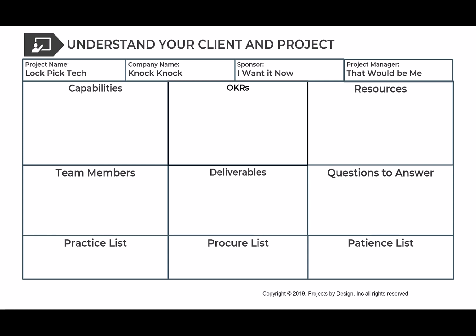Sciforma is the only tool that I've seen that does this well, where you can actually have multiple patterns, because what you run into is you have to do one or the other. In a Clarity or something like that, you do a work breakdown structure of activities, and you have to determine what level people enter their time. If it's at the activity level, they're going to have a timesheet of like 50 things, right? And then they start barking, and management says, no, that's too much overhead. Let's move that up a level. And then it loses its granularity, and you lose your progress, and then you have all kinds of problems, right?